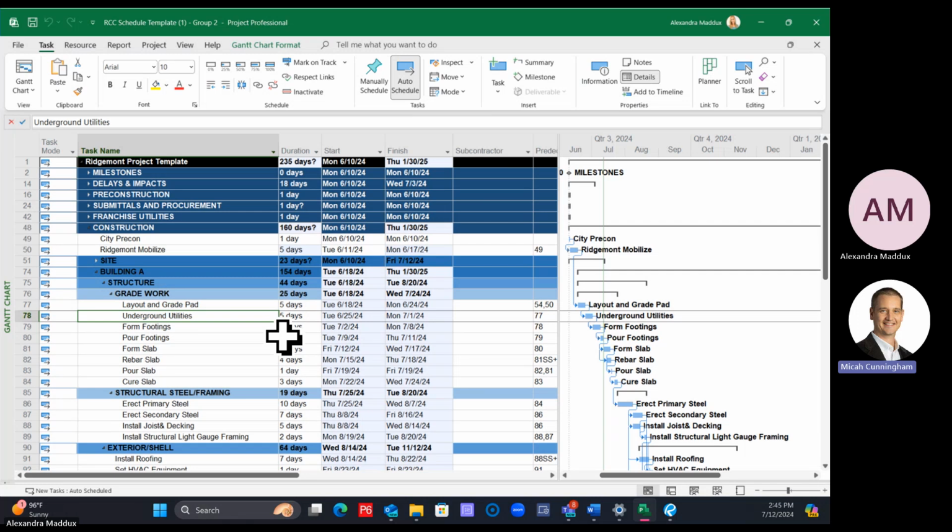Or even if maybe you have like 25 days here, but they don't both have 25 days, then you can break it out into the duration that they individually have. They're very crybaby like that. It's also dependent on the type of schedule. If I'm doing a master schedule, I don't want to break it out. It just depends on what you're wanting.